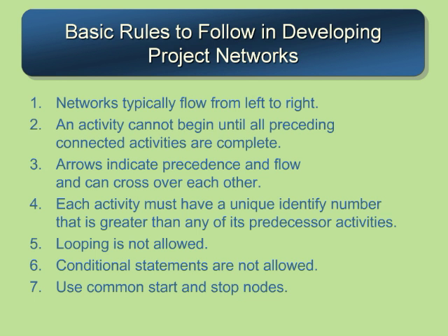So those conditional statements are covered more by risk analysis, and we'll get to talk about those pretty soon. And last thing, if you've got lots of activities that roll up to end the project or that need to be started at the same time for the project to officially start, you use common start and stop nodes on your project network.